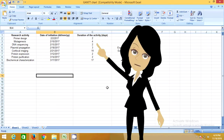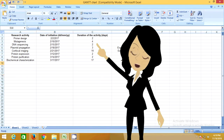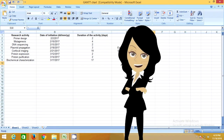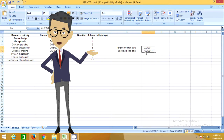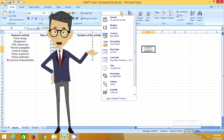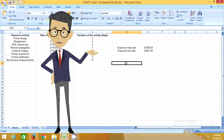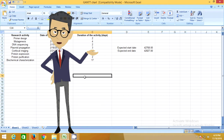First of all, make a list of all the proposed experiments. Make sure you include the start dates and the corresponding durations. Microsoft Excel stores dates using serial numbers. Make sure you convert the start and end dates, as shown in this video.